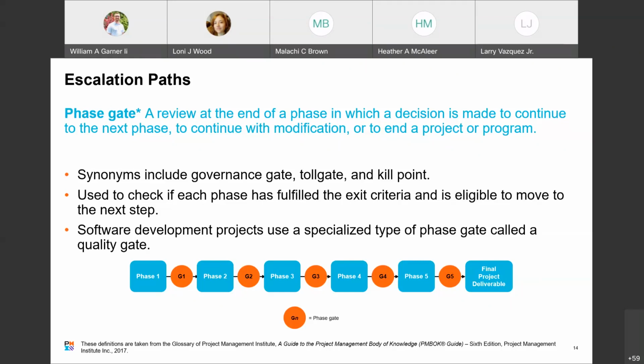But I can add a little color to just the gates itself. If anybody does any technology projects and uses the PMO framework here at AT&T, there are decision gates. It used to be that the decision gates were leadership meetings, and now they're just voting structures. Internally, we use a program called TMAT, and all those gates are automated with that. So just to add a flavor, it aligns and makes sure everybody is ready to move to the next phase, just like William has said.